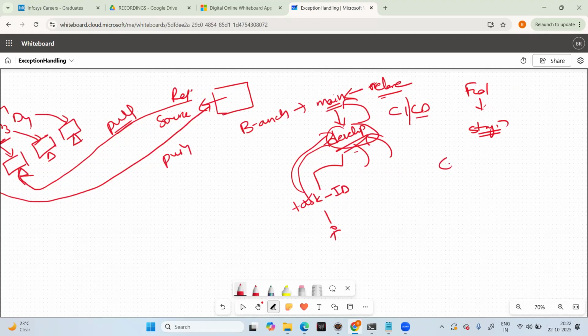In grooming sessions only, these stories will be discussed, and while discussing them, the developer will clear all his or her doubts. How to implement? What are the scenarios? What if you do it this way? Why should it be done only this way? You will give some inputs, or else if you have any questions, they will get clarified. Once the grooming session is done, that respective story will be taken to the sprint.